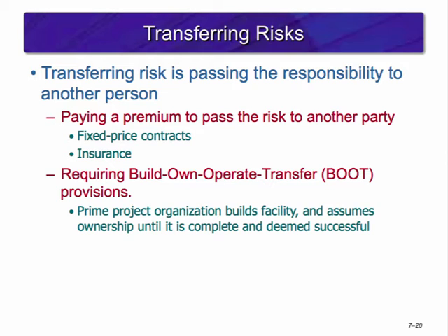On large international contracts, host countries are insisting on contracts that enforce the build, own, operate, transfer provision. This states that the prime project organization will build, own, operate, then transfer the facility to be built until such a time as it has been proven successful. In this case, the host country transfers financial risk of ownership until the project has been completed. The transferring risk response is most effective when dealing with financial risk exposure.